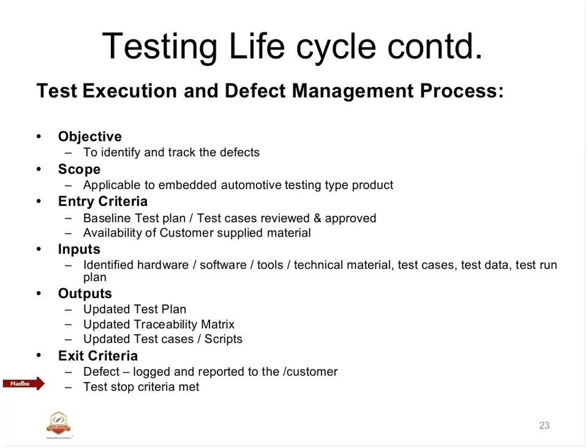Suppose I have some 100 requirements to be tested. In that I have completed about 60%, that means 60 requirements I have covered. Now I found out that 50% of these requirements have resulted in bugs. Let's say 50% is too high, say 20% of the tested requirements have bugs, meaning that twelve requirements have failed. Am I right? Yes. So 12 requirements have failed.